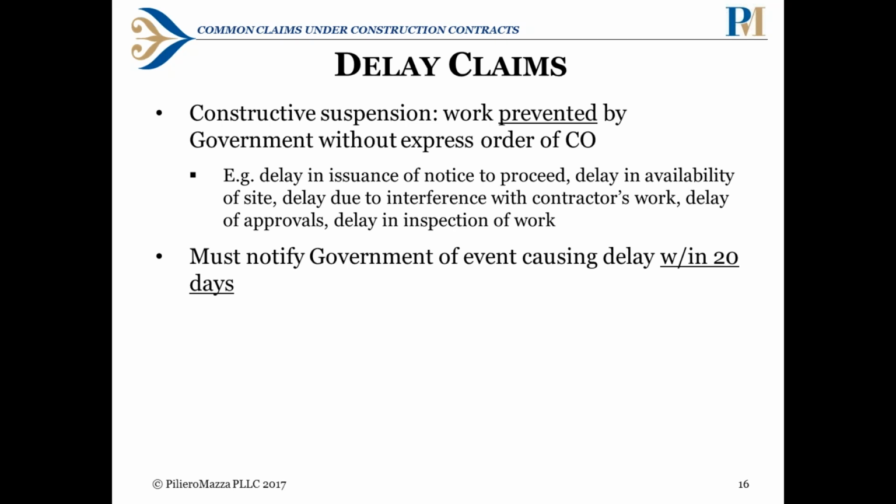And then we also have constructive suspensions, and that occurs when the government doesn't directly order you to stop working, but something happens in the course of the project that prevents you from moving forward. So that's why it's viewed as a constructive suspension. That happens oftentimes when there's a delay in issuing a notice to proceed. There's a delay in the availability of site, like if you're working in a dormitory or something on a military base and the people who are living in that dorm are not out when they're supposed to be. That would be a constructive suspension.